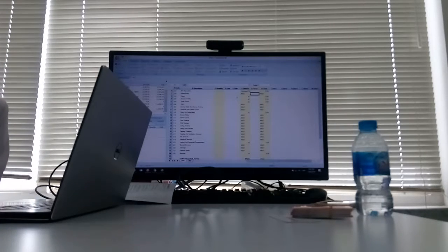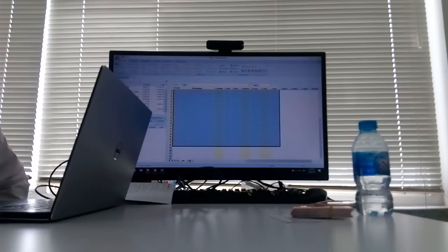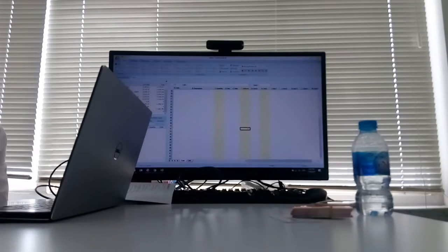We can do it through QR. Yeah, and then you can do things like show source, so you can actually see that quantity in the table, where that actually came from on the drawing. Ah, okay, very useful. With revisioning and things like that, variations, you can overlay the drawings to show this is what it was, what it is now. You can't argue with it.